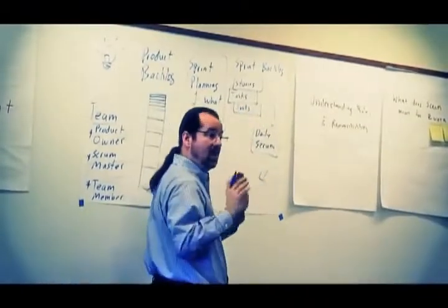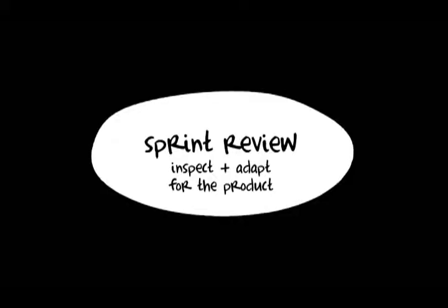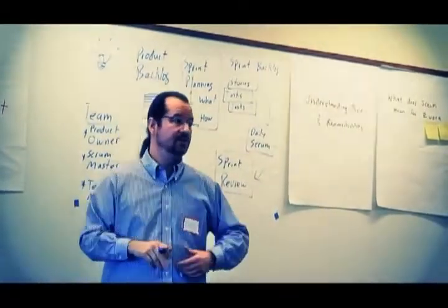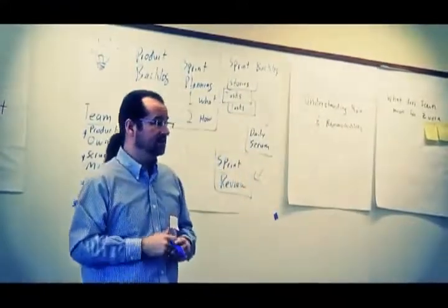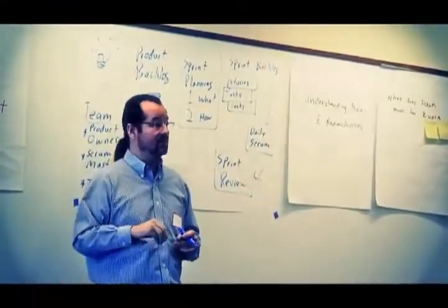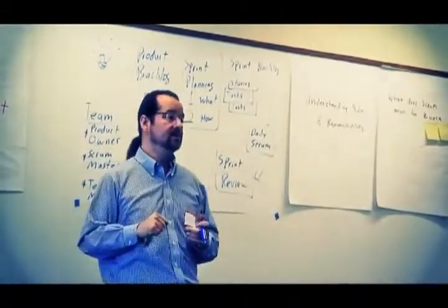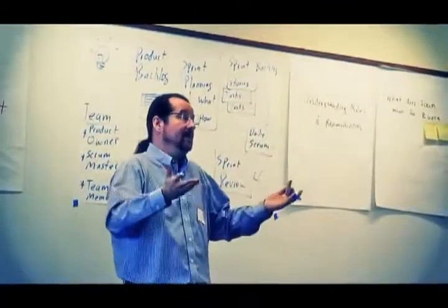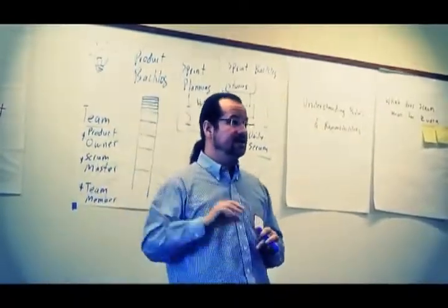And then we have the public end of the sprint. It's called the sprint review. We invite all the stakeholders that we can to this meeting. It's very public. We show them what we did this sprint. We tell them if there were any stories that we committed to that we didn't get done, because we want to have transparency, we want to have openness. We don't make excuses, we just say, hey, there's the story, we committed to it, but we didn't get it done. Then we move on, and we show the work that did get done, right?